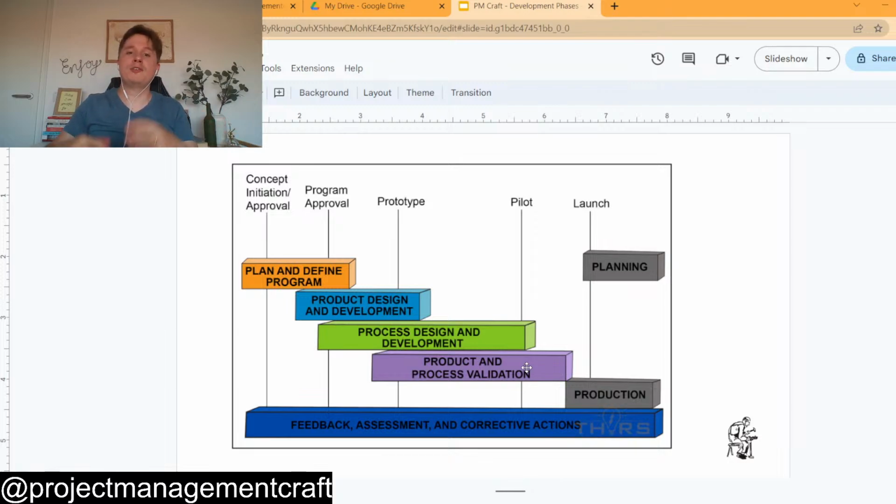For example, if you want to do the qualification, you need samples. If you are talking about, in this case, the pilot sample because it's a serial sample, you need the process to be developed. If you need the process to be already mature in development, you also need to make sure that you have a frozen product design. So every time you go for a new project here, not only automotive, you need to understand those different phases and how those things are interconnected.